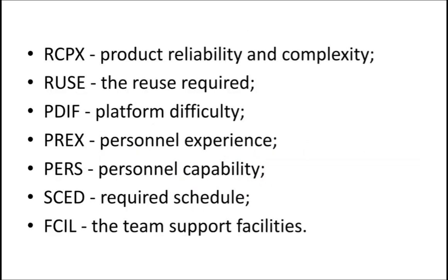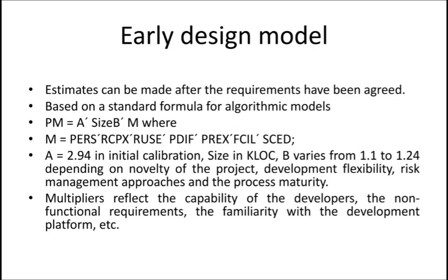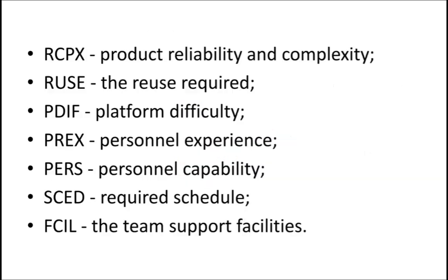What are these? RCPX means product reliability and complexity. RUSE means the reuse required. PDIF, I'm using all this. M contains these matrices. A means what? A is a constant value, 2.94. B value is from 1.1 to 1.24. But M contains these different matrices. Based on that, this is simple. Based on the formula, you are going to calculate all these estimates.